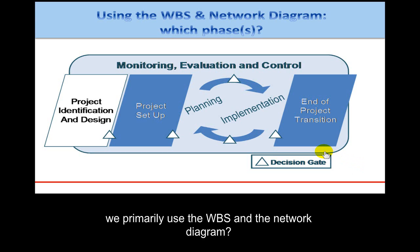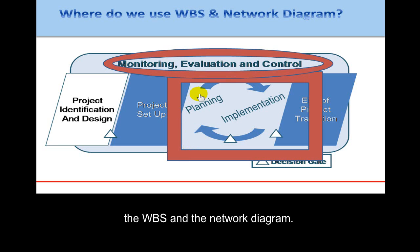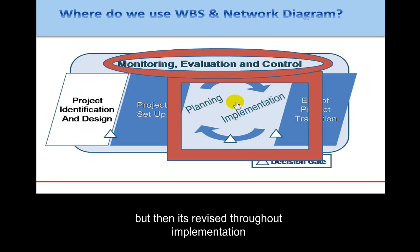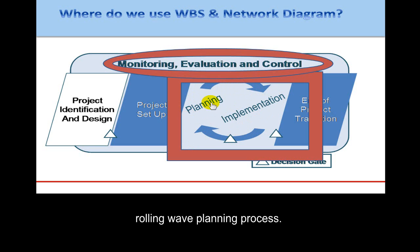Which phase of the PMD Pro 1 phase model do we primarily use the WBS and the network diagram? This square represents the main place where we use the WBS and the network diagram. Initially it's used in planning, but then it's revised throughout implementation through this iterative cycle — the rolling wave planning process.